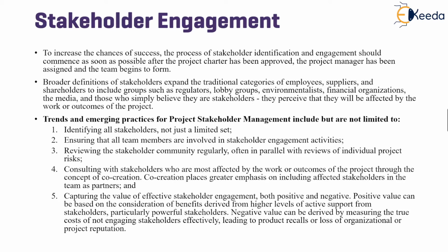Consulting with stakeholders who are most affected by the works or outcomes, through the concept of co-creation. This puts a greater emphasis on including these affected stakeholders as partners for decision making and ensures that the project moves in a proper direction. Thus, if you capture the value of these affected stakeholders, both positive and negative, it will highly benefit the project.